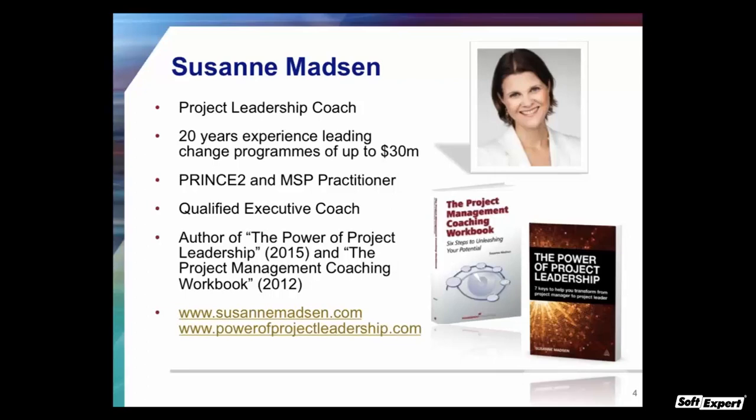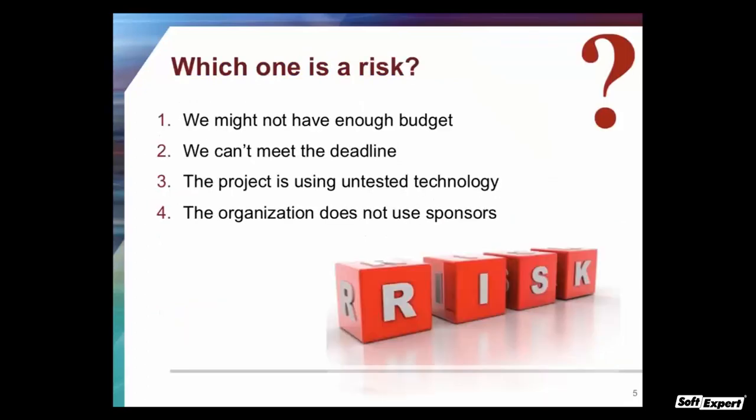The first question — which one of these is a risk? Is it number one: we might not have enough budget? Number two: we can't meet the deadline? Number three: the project is using untested technology? Or number four: the organization does not use sponsors? Many people are saying number three, the project is using untested technology — but that's actually wrong. Only one of these is a risk, and it is not number three.